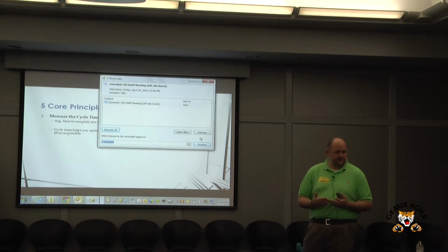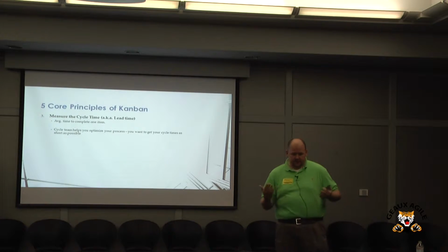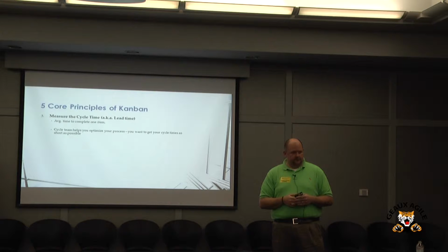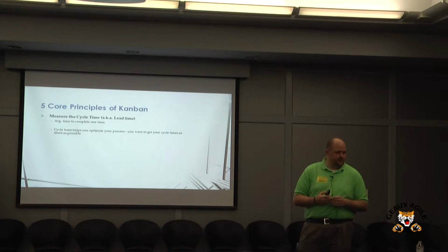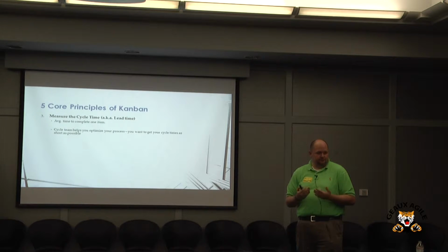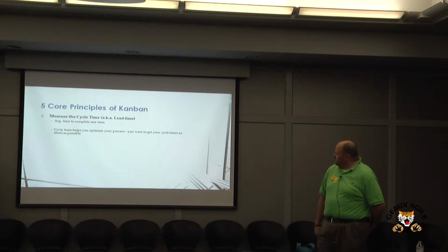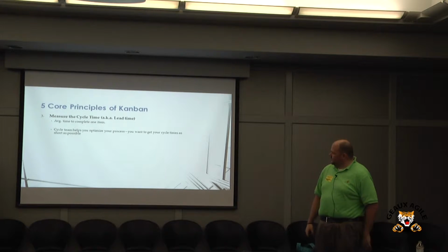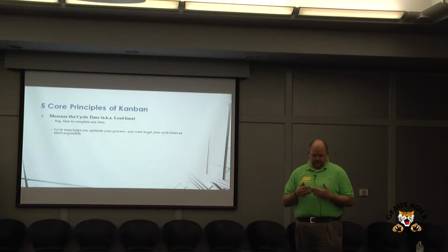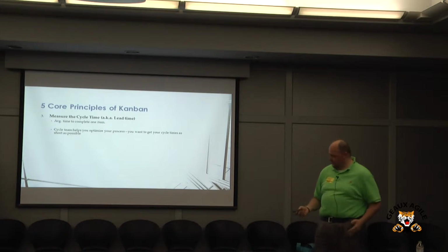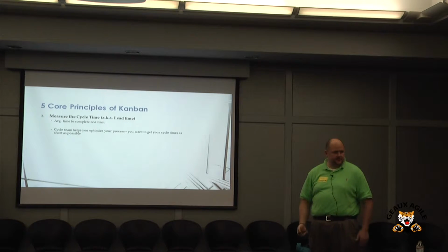Speed the process up. Maybe in software your average cycle time is 3 days, 5 minutes for every item that comes in. And maybe that's great. Maybe you can find some things and get it down to 2.5 days. So that's your cycle time. Some Agile practitioners and project management practitioners call this lead time, but it's just the time to complete something from start to finish.